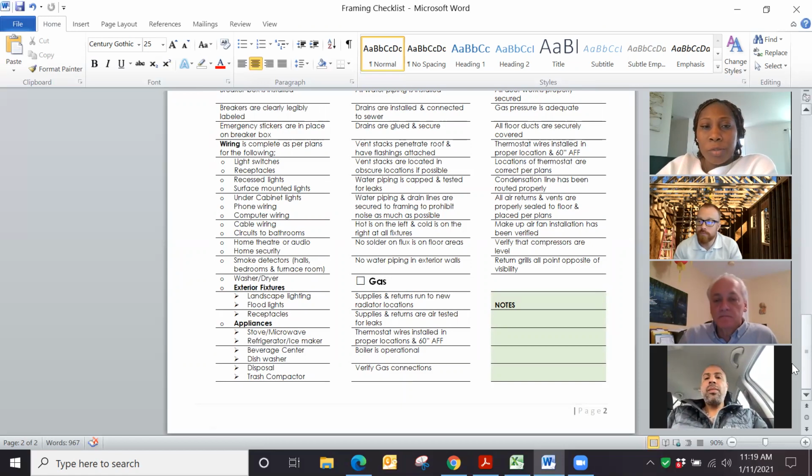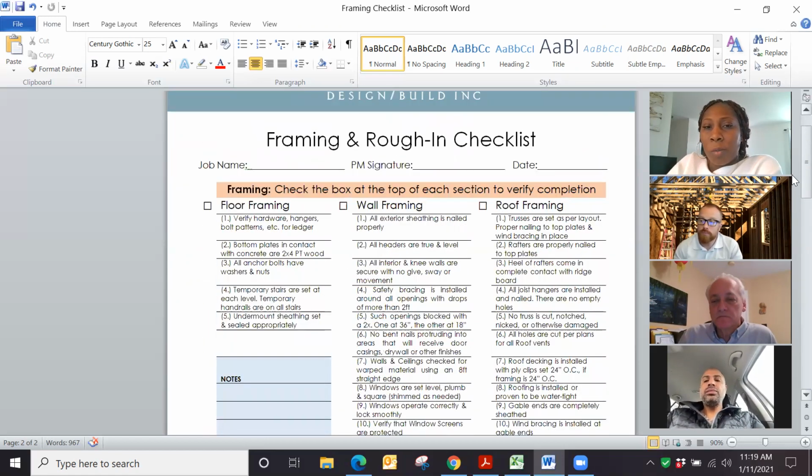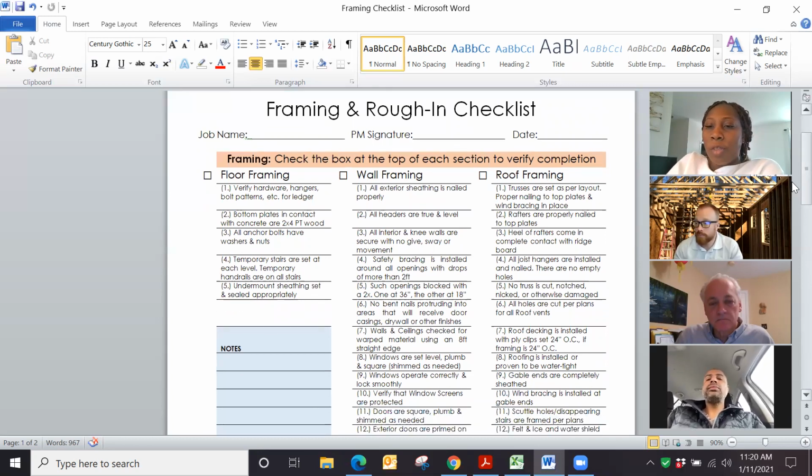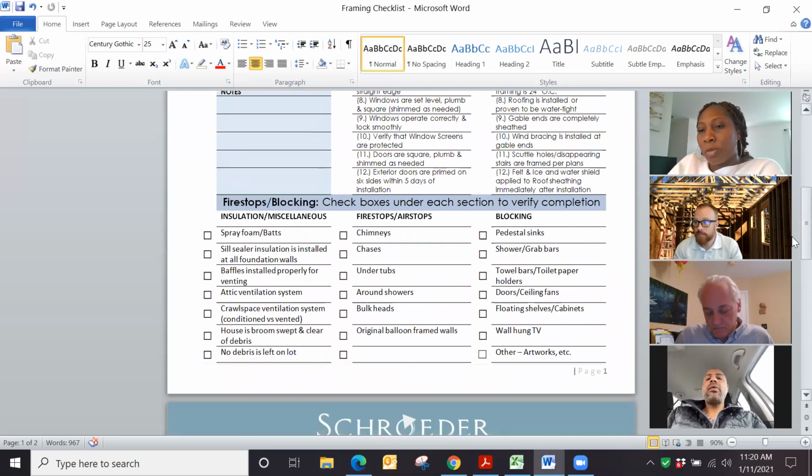Andrew, you might have mentioned it earlier, but just to clarify, when are these checklists happening? We're assuming the framing one can happen right around when Ruffin is starting, because all the framing is done for the most part by then. Then the Ruffin one will happen probably around insulation, because Ruffin's completed at that time. And then insulation fire blocking would be the last.